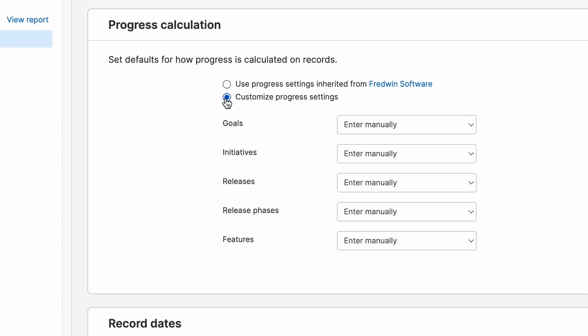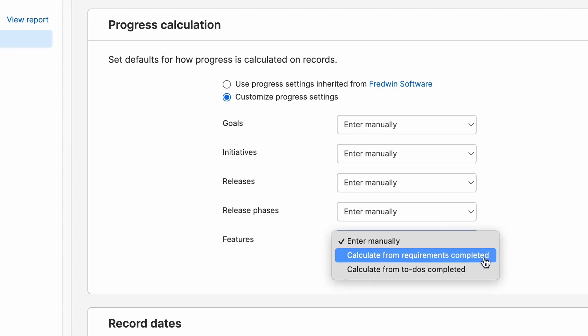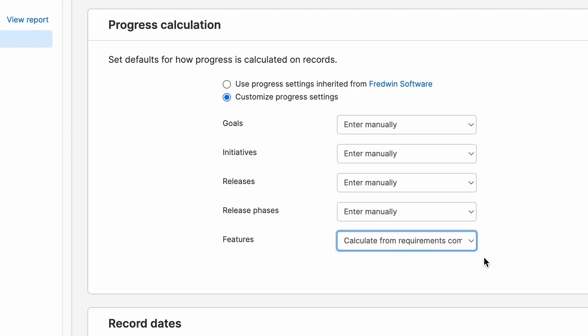If we choose to customize progress settings, you can start to take a closer look at the options available. For example, with features, you can enter manually, calculate from requirements completed, or calculate from to-dos completed.